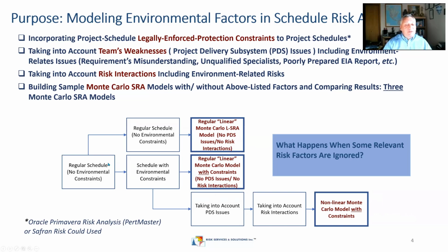First is just a deterministic schedule without any constraints, without any risks. Then we can add, we can just build a regular Monte-Carlo model as everybody can do. And it will be called linear SRA model in this presentation. So no PDS issues, no risk interactions.